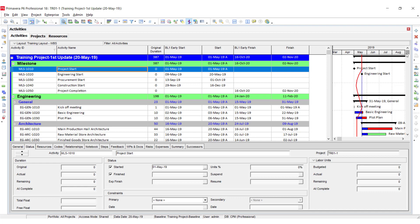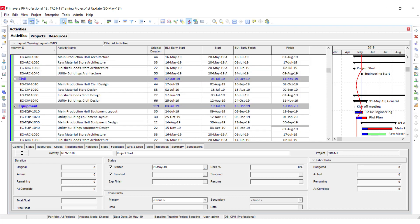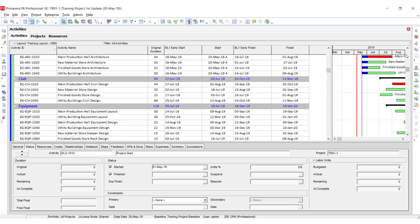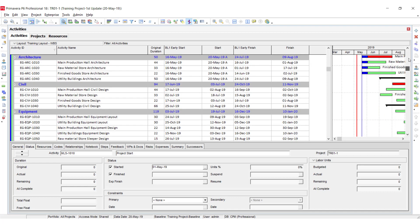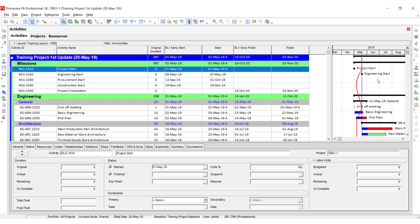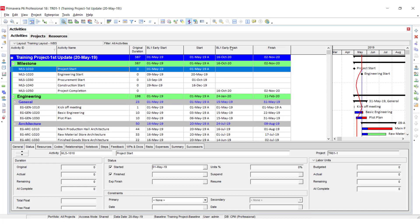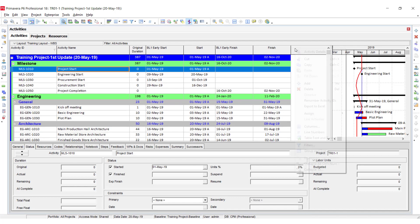By using the progress line, you can see that if the red line is behind the data date, it means you are behind the schedule. If the red line is after the blue date, it means that you are ahead of the schedule.